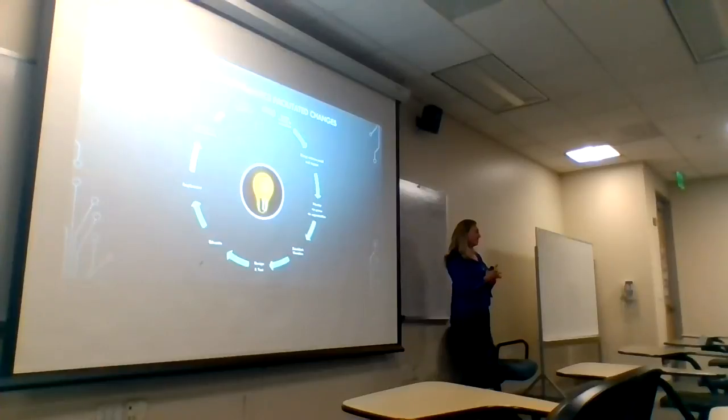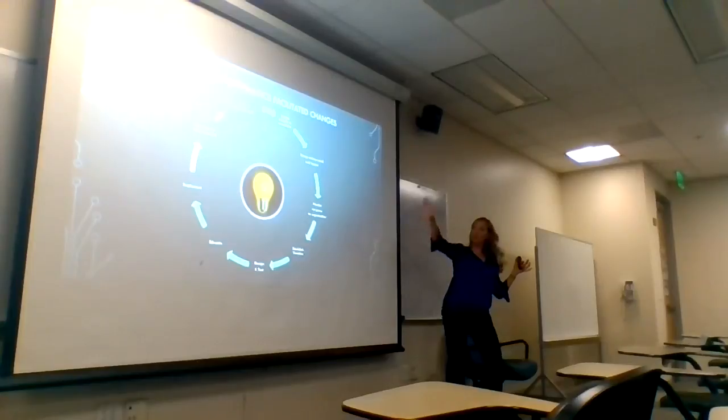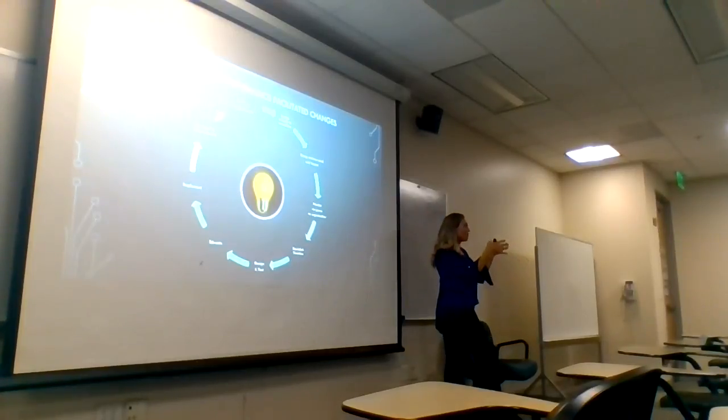So when you're doing this cycle, back to the financial part of it, how do you decide who's paying for what? That's where it gets tricky. I'm glad you asked because it's a really good question. We have a couple of buckets: a project bucket, and a change bucket. The change bucket is our everyday changes, not quite large scale projects, that need resources. Those are what I'm working through here. So it's that smaller group.